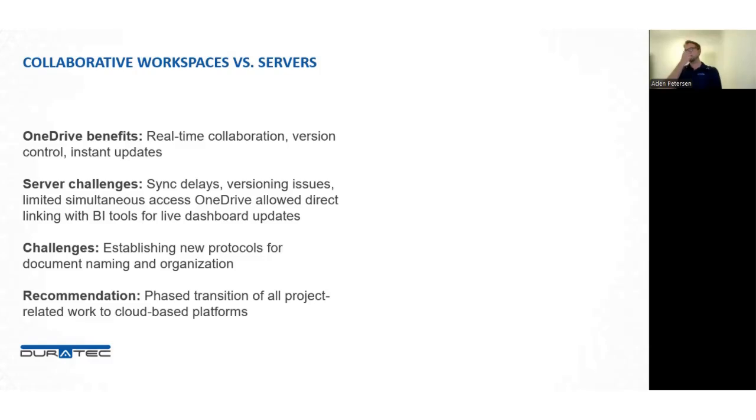I'll quickly go through this due to the interest of time. We were using a combination of a server-based system and cloud-based. We found that cloud-based offered some real-time collaboration and an increase in administrative hours and administrative acceleration throughout the project. Version control was automatic, and using those online cloud platforms allowed direct linking into Power BI tools for live dashboard updates.